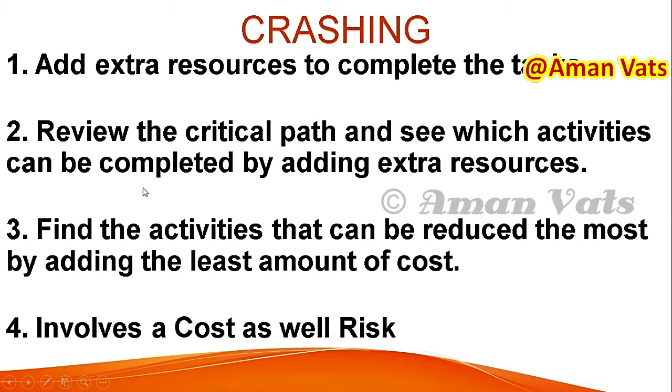So it involves a cost as well as a risk. In the previous technique, fast tracking, the cost was not involved much, but risk was there. In crashing, you have cost as well as risk because you are going to increase the resources.